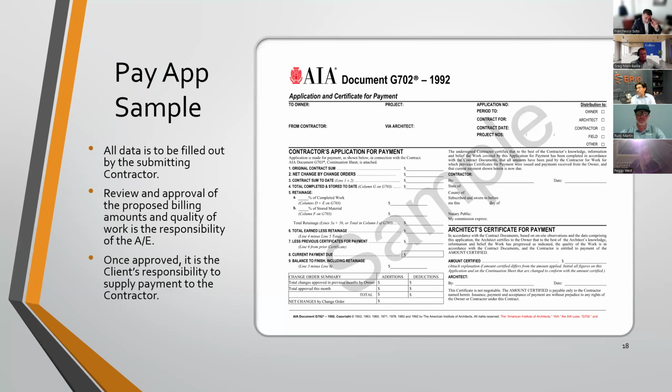That's one that I look at as well, especially if you're using the AIA document. If you look right above the contractor signature, they're certifying that the work covered by this application has been completed in accordance with the contract documents. Notice contract documents is a capitalized term. It means something. It means that you're going back to your contract and all the exhibits, tying all this in. The exhibits that are attached to your contract set out what needs to be installed, how to have it installed. If things go wrong, this document gives the owner a lot of protection to make sure that the work was done in accordance with the contract documents.